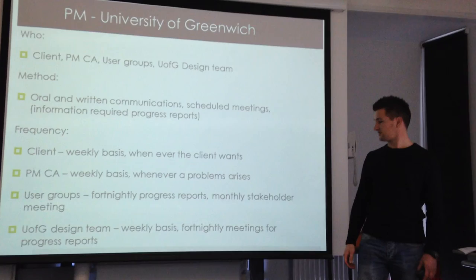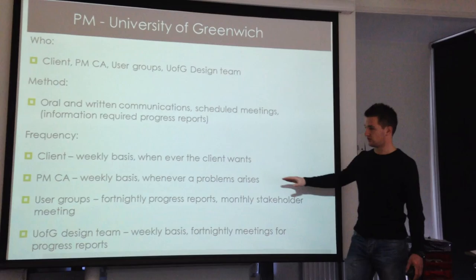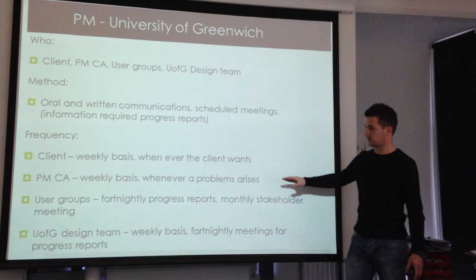And the University of Greenwich design team — again, a weekly basis, with fortnightly meetings for progress reports from the design team. A lot of these meetings you're going to be able to do at the same time. So when you're having a project manager meeting with your client, you might ask the architect or the quantity surveyor to come along with their progress reports, so you can all get your information out in one go straight away.